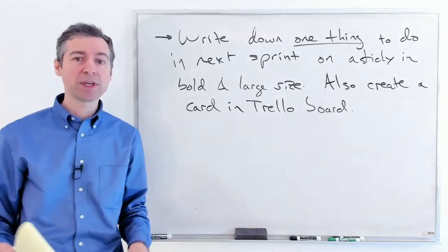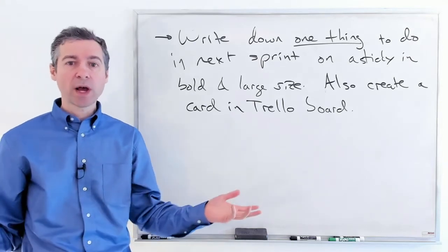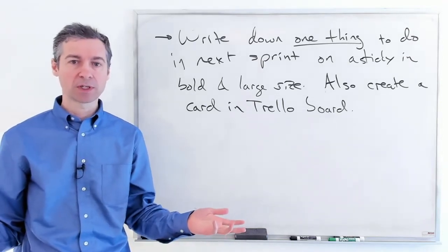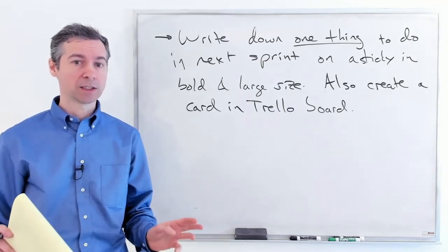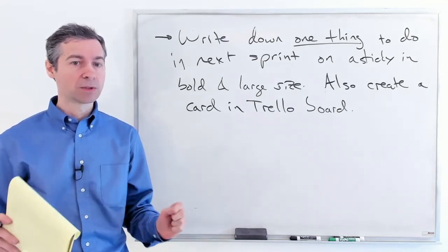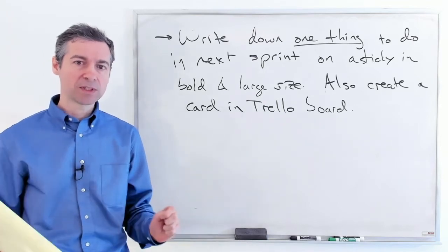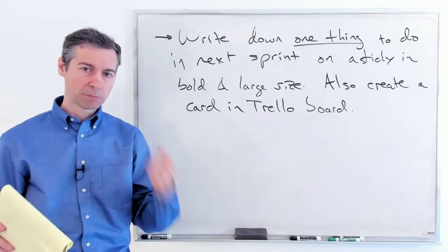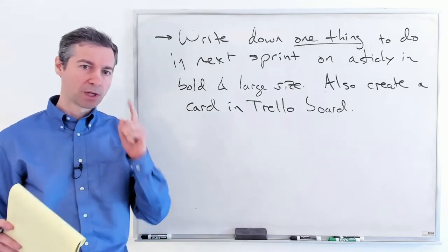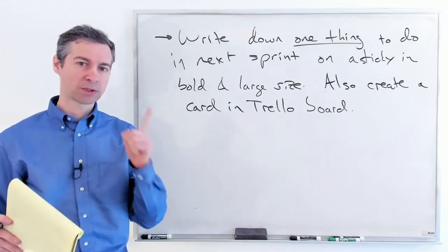Even if you're doing 2-week sprints, you're going to have over 20 process improvements within 1 year. That's a lot of improvement. And so to help the team really master and embed that new process improvement, have one per sprint to work on.